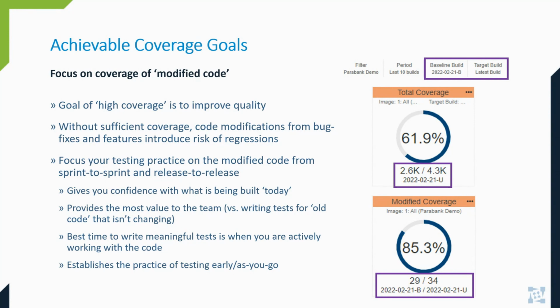And running these analytics throughout the sprint cycle can be helpful because teams will get real time feedback on whether their current regression suite is delivering sufficient coverage of the modified code, or if they need to invest in creating additional tests so they don't get uncomfortable questions during the sprint review. And so, speaking of the sprint review, if the team's modified coverage is low, that means they're doing feature development at a pace that will cost them in software quality. If we think back to that scale that we saw earlier, and we imagine it tipping too far in the direction of agility, using these analytics is a great way to balance that agility and quality with data that's coming out of your process, out of your pipelines.